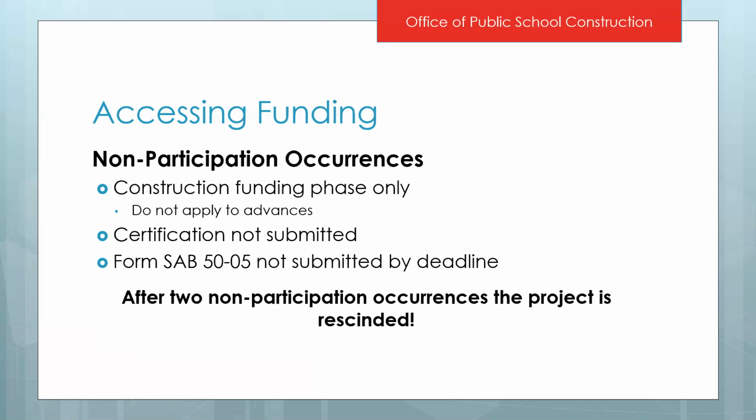But once you convert and you are on the unfunded list for your adjusted grant, anytime you do not participate in a certification round, or if you do participate but fail to make that 90-day deadline to request your funds, you receive a non-participation occurrence. After 2 of these, the project is permanently rescinded and is no longer eligible for funding. Again, remember, this does not apply to your advanced funding for design and site. This is only for your construction funding phase.